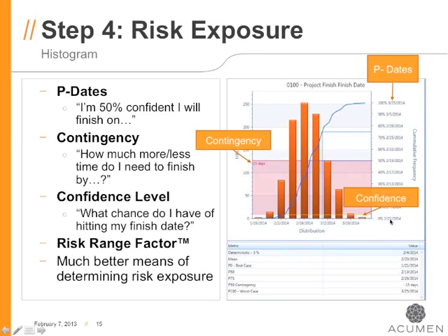So in our example here, our range goes from the 21st of January through the 25th of March. So that's approximately a 3-month spread. That 3-month range, if you then compare that to the duration of the project, perhaps it's a 3-year project, then approximating the math there, 3 months uncertainty or 3 months risk exposure over 3 years is about a 10% risk exposure variable. And so reporting that with the work remaining, there is a 10% variability with regards to risk exposure is a much more meaningful metric than going back to management or going back to the sanction board and going, okay, well, we got a 3% chance of coming in on time. That confidence level is a very, very misleading metric.